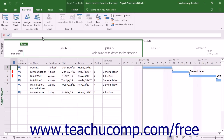This feature lets users across a network have simultaneous access to the sharer project files, where they can make assignment changes, and then save and update the information in the resource pool, without opening the resource pool as read-write and preventing other users from making their assignment changes.